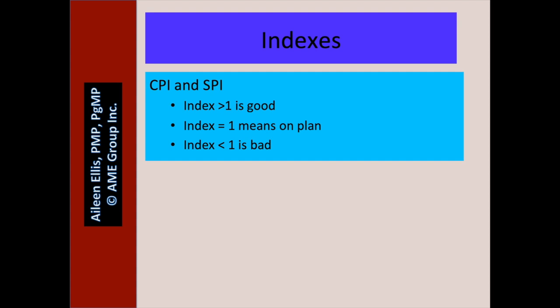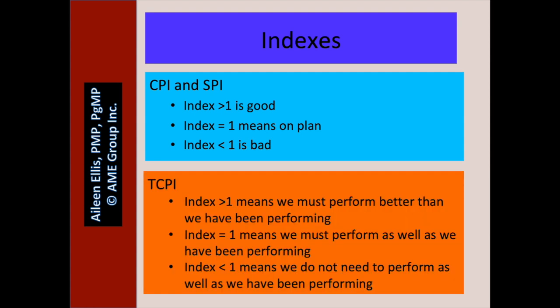To compare and contrast: with CPI and SPI, indexes greater than 1 are good, equal to 1 means on plan, and less than 1 is bad. With TCPI, a value greater than 1 means we must perform better than we have been — it's harder to achieve. An index equal to 1 means we must perform as well as we have been. A TCPI less than 1 means we do not need to perform as well, so it's easier to achieve. Now let's look at a whole group of sample questions to wrap up this video.